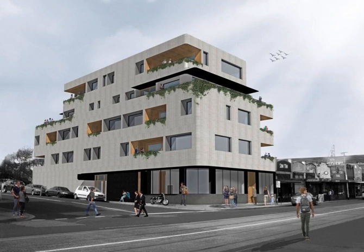The critical path is always the structure. So, we're sliding in the other elements into that critical path, but being very mindful of not tying up resource so that structure can't continue. So there's a few things we're working through at the moment to try and work out how we can simultaneously keep those two line items running on a critical path. But yeah, those are the early discussions that we work through as a core group.